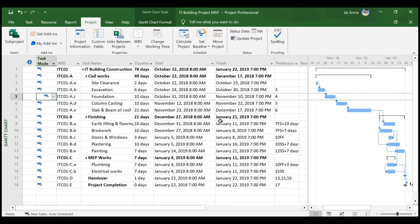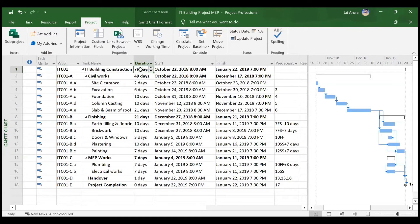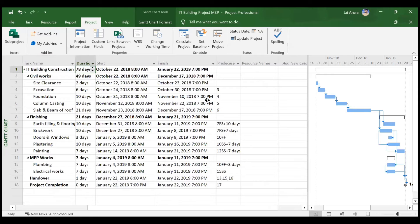Now everything is back to normal. The project calendar is now based on the IT Building Calendar, so the end date has shifted from 8th February to 22nd January, but the duration is still 78 days — same as before. The 78 days is calculated based on working days of the activities and does not take into account leaves and holidays in between. All working days are added up to 78 days, so the total duration doesn't change regardless of what calendar you assign.